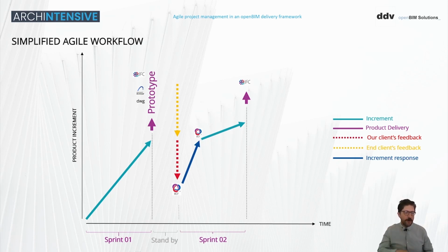They require some stuff, but three weeks later they change their minds. This is quite usual. So no matter what, you are spending some part of this cycle fixing these issues. Once those issues are fixed, you can start what was planned for the second sprint. That's why here the product increment slope is a bit lower, because the length of this sprint was already